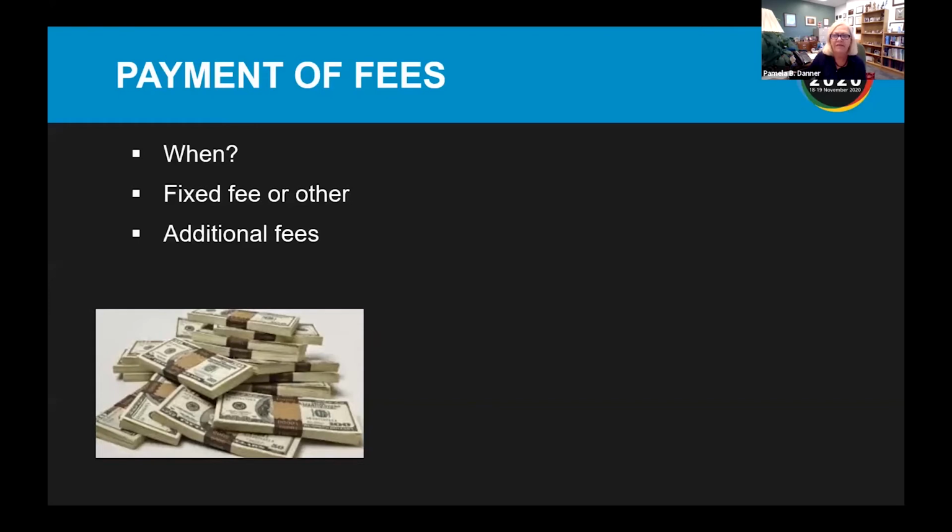And it also says if the client withholds payment, the client must give 4 days notice prior to the payment due date of the reasons why. And then there's a process for handling that. Now, in the US, I know at least, the architect may want to pay when paid if you are a subcontractor to the architect, which is a problem. But if so, and you can't negotiate out of this, then at least it needs to state in your contract that you be paid within a set number of days after the architect is paid. I would state that this should not be more than 5 or 7 days.